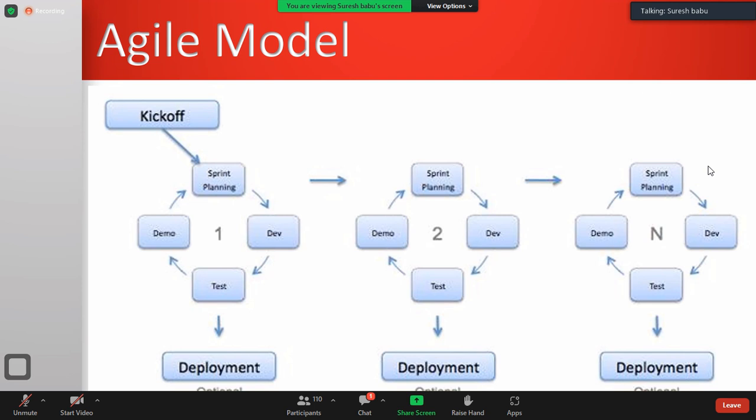In the first sprint, we focus on developing only 2 functionalities, in 4-5 days of schedule. Next week, we focus on other 2-3 requirements. Next week, other 2-3 requirements. Like this, the system gets implemented, not all in one schedule. Because if there are 40 requirements to be implemented and I give you a KT on all 40 requirements, 4-day sessions continuously, from morning 9 to evening 5 o'clock, inside the company, in a conference or meeting organized...